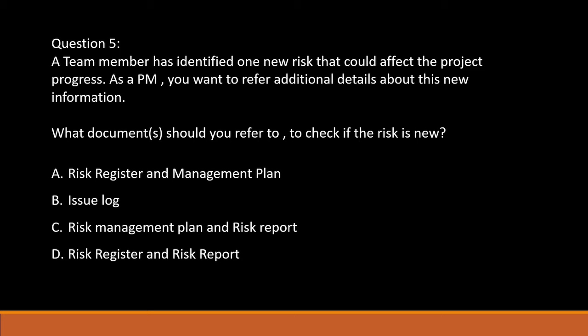The correct answer for this question would be option D. You want to refer to the risk register and risk report to find out if this new risk is even new or it has already been identified.